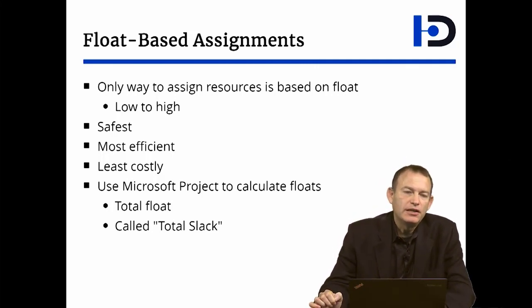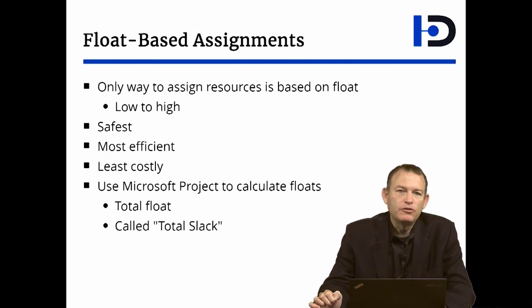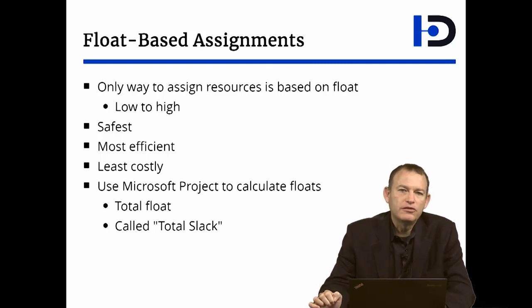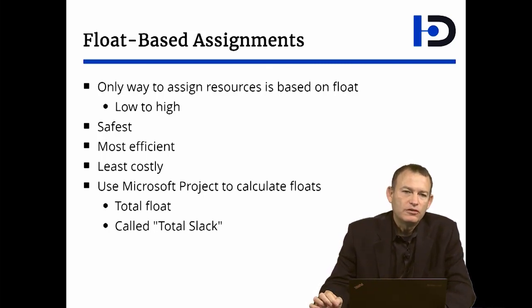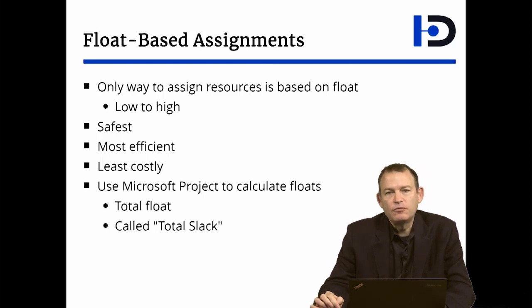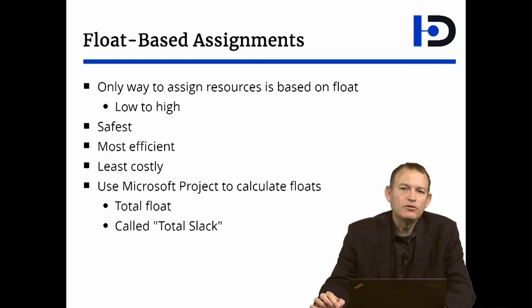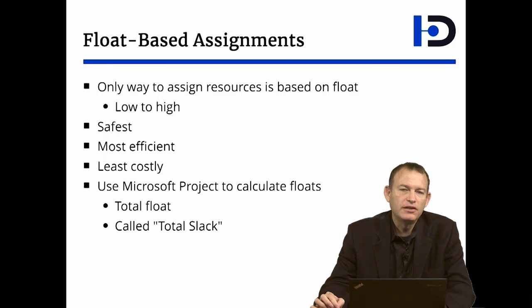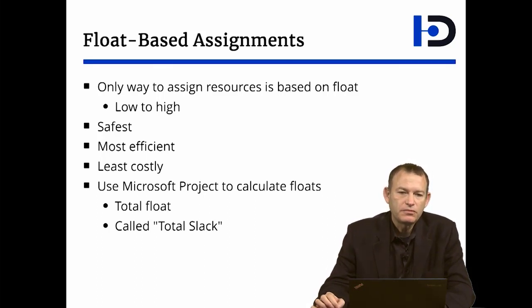And finally, float-based assignment allows you to trade resources for float, which reduces the amount of resources required for your project. And by doing so, you reduce the overall cost for your project so you find the least costly way of developing the system.